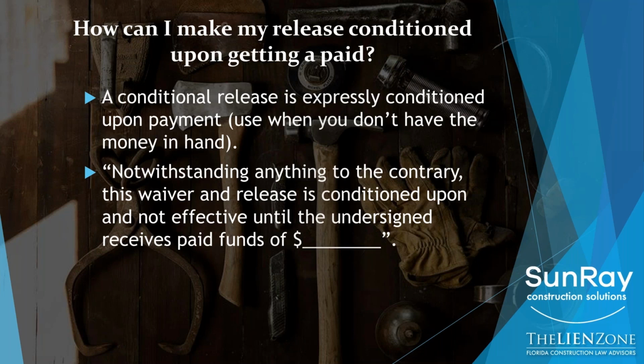We have yet to hear back from the other side, because that letter just went out yesterday, on what position they're going to take. But if they've already funded the contractor based on our release, we're going to be in a tough spot to suggest that the owner didn't have the right to rely on that release. So it's absolutely critical that if you are giving a release without actually getting a check, that you make it conditional.